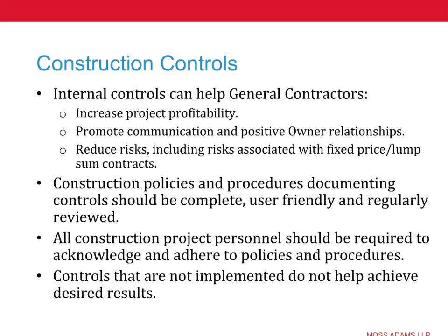So this is an area where we've been doing more work on the part of contractors. For example, you have a contractor that has DOT-funded contracts, and they're subject to disadvantaged business enterprise reporting requirements. There's a lot to do there, it turns out. And so contractors, especially the bigger ones, may have multiple locations, they're a general contractor on a DOT-funded contract. They have a lot of responsibilities for making sure that the subs on their jobs are meeting their DBE requirements. They're usually given a certain percentage that they need to fund those subcontracts. Those need to be DBEs, and it's usually 10%, but it can differ from contract to contract.